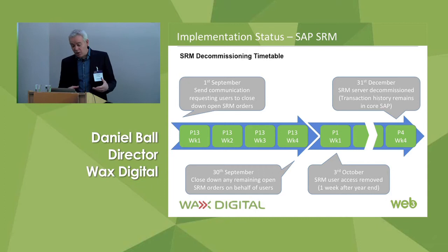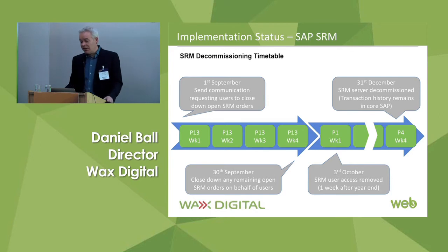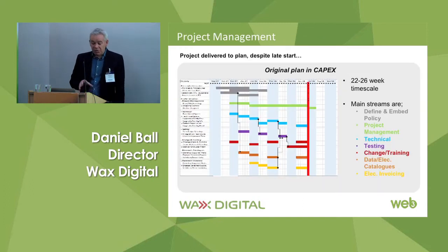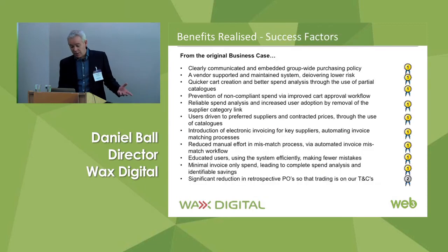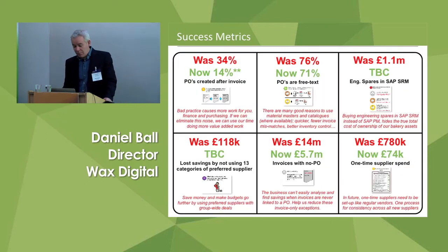Who can manage and organize any aligned technology streams, such as, in this case, the decommissioning of the SAP SRM system that we were replacing with our P2P solution. All under the umbrella of a detailed project plan across those various streams, and with a responsibility, again, for seeing through the initial stages of measurement and reporting for those goals and objectives that I was just talking about previously, which hopefully ends up being reported, something like this, and leads to a clear and quantifiable set of KPI measures that demonstrate real value back to the business.